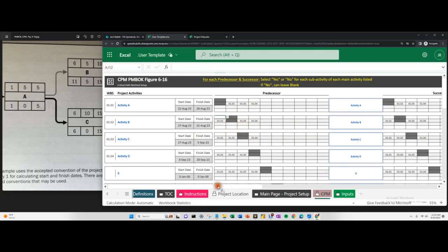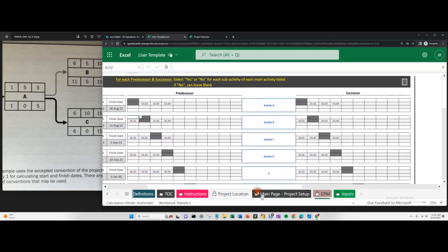Now, if you didn't see the other videos, just to explain this really fast, the predecessors come before, successors come after the activity. So just displaying it here to try to make it a little easier to understand. Here are the activities in the middle. Everything before these activities will be over here. Everything after these activities come over here. So again, nothing comes before A, but B and C come after A. So A, we have B, yes. C, B and C, yes. So B, C, that's D.